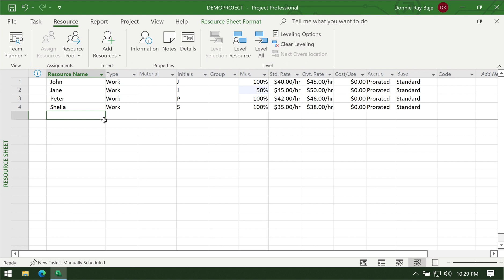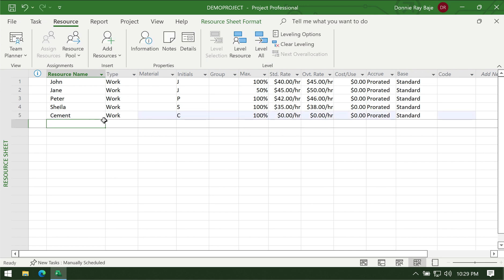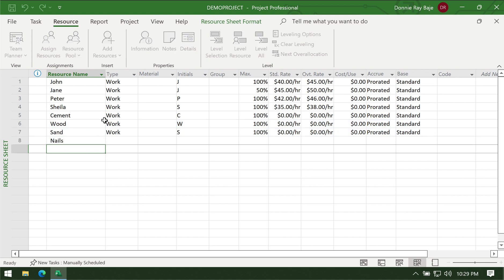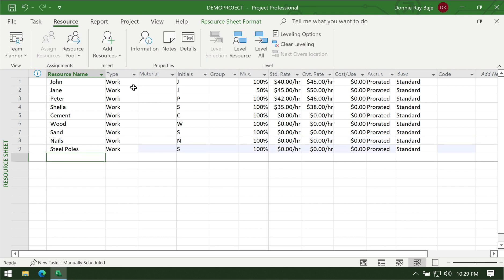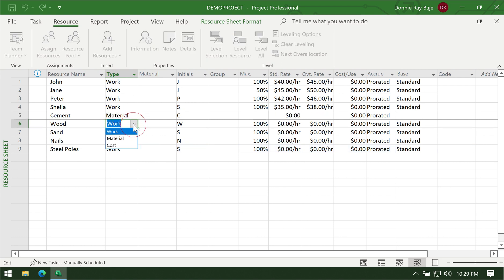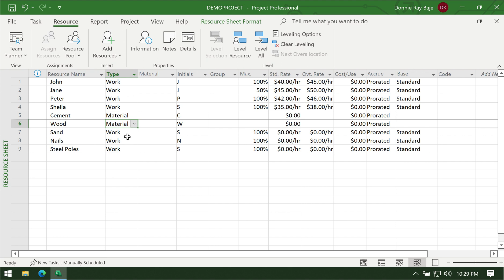The next type of resource pertains to materials. I'm going to put in some materials here — we have cement, wood, sand, nails, and maybe some steel poles. For this kind of item, we have to change the type to material, so that we won't be required to provide the max allocation and the overtime rate, because of course materials don't render overtime.